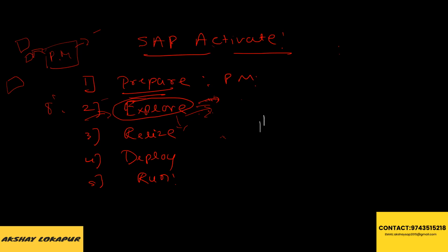Yeah, let it be, because we are giving the sandbox server, not our main server. We have development, quality, and production servers, and one more server, the sandbox server. You can play with it like the IDS server; whatever you want, you can do it here. This server access we'll give to them, not our development, quality, and production servers. Once your user acceptance testing is done, then only will we give the quality server. Before that, we'll give the sandbox server only. Here only we'll do and show.